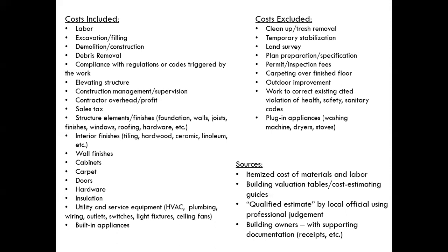Of course, your sources for cost to repair could be an itemized cost of materials and labor, building valuation tables, and those cost estimating guides. If you have someone who's a local official that is a qualified estimator using their professional judgment, or the least favorable would be building owner provided. If they have supporting documentation, like the receipts for some of these materials, we just try to keep them out of the assessment altogether since they're not really objective.